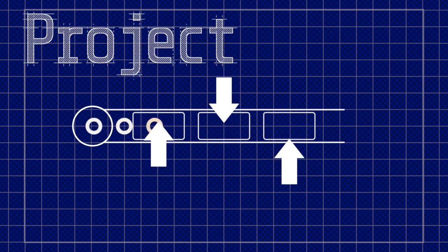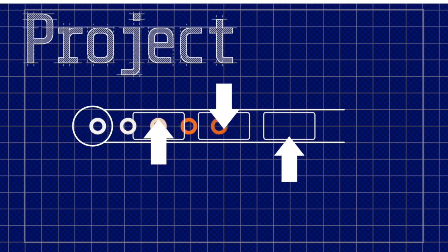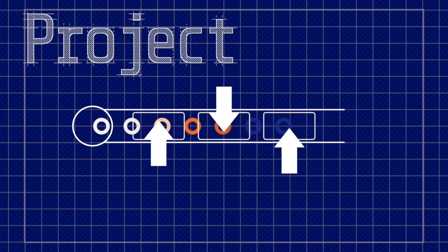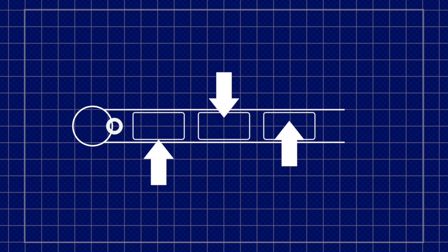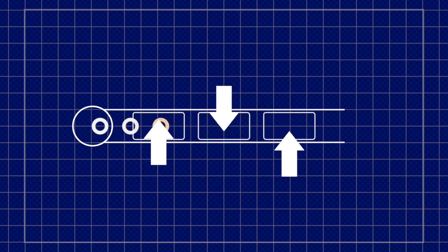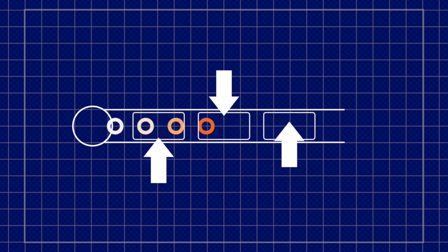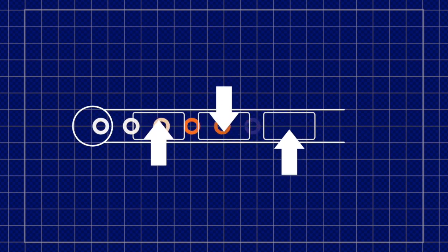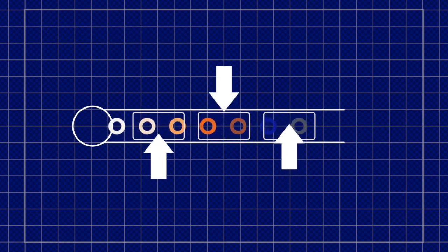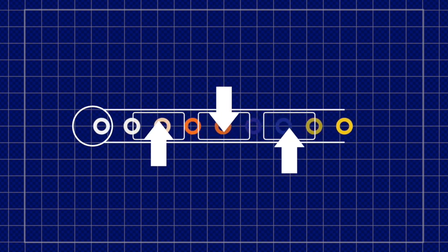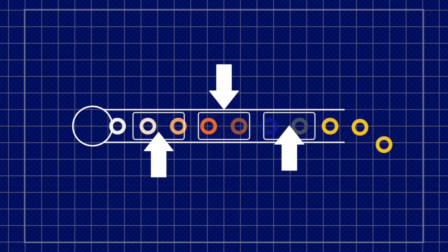Now let's look at a project. Some requirements go into a pipeline. A series of processes take place and a finished deliverable comes out of the end. What Kanban does is make the position of each requirement in the pipeline very clear. And if some are getting stuck and there's a bottleneck, the project manager can easily spot it, and then they can deploy resources to address the issue.